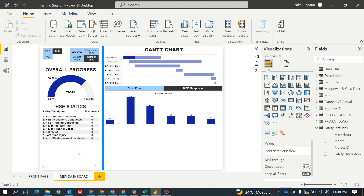In our next video we will be seeing our engineering KPI, project key milestones, and the weekly plan versus actual graph for engineering — for shop drawings, method statements, and material submittals. We will also include earned versus certified: how much we are claiming, how much has been certified, just to track progress and know our quality — how we are submitting invoices, how much is being approved by the consultant — so management will know how efficient we are in reporting progress.